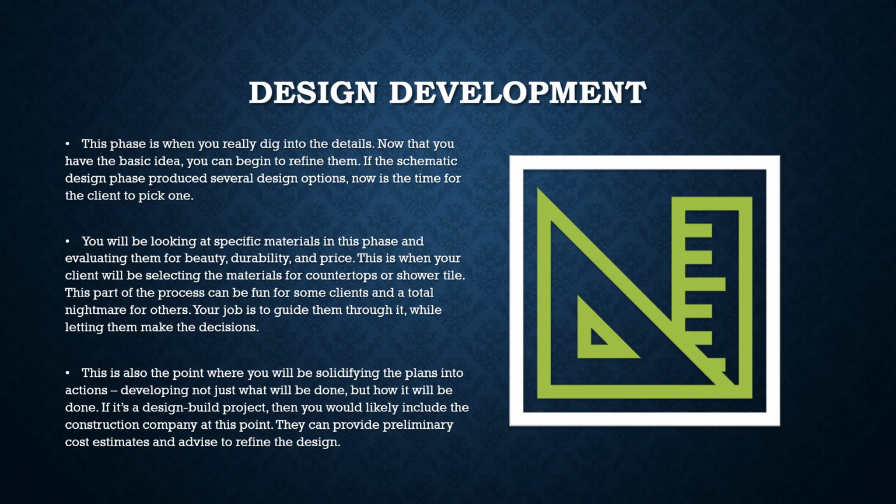This is also the point where you'll be solidifying the plans into actions, developing not just what will be done, but how it will be done. If it's a design-build project, then you would likely include the construction company at this point. They can provide preliminary cost estimates and advice to refine the design.